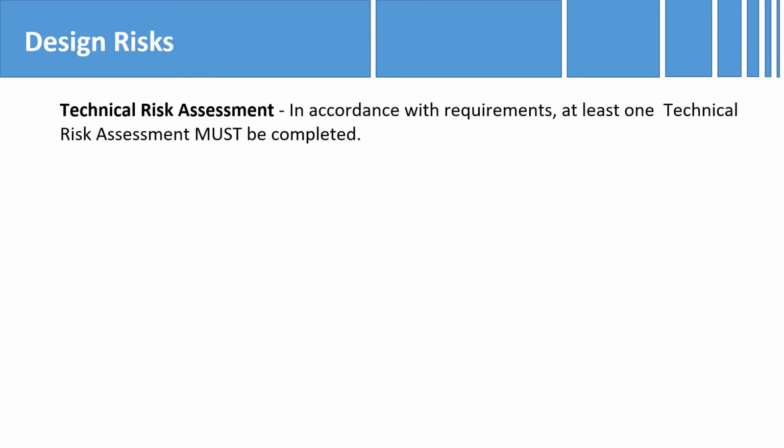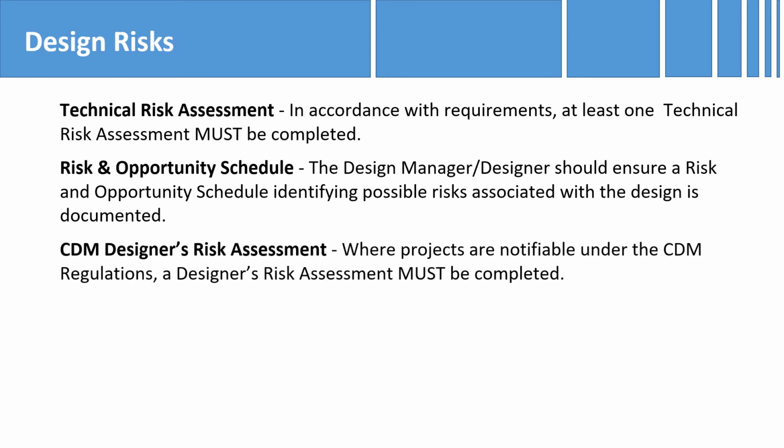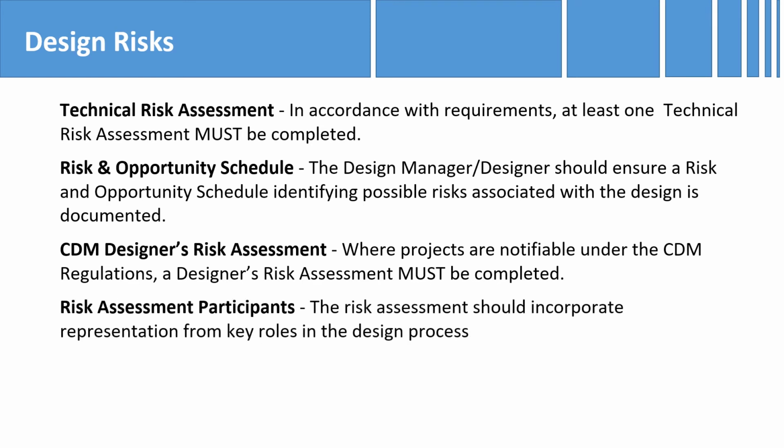Appropriate risk can fall under many disciplines and activities, of which the identification of technical risks is key to the safe delivery of the project. The design manager must ensure that all technical risks and opportunities are documented and considered in the applicable risk and opportunity register. If we are performing a designer role on a CDM applicable project, we must ensure that a designer's risk assessment is carried out. Risk assessment reviews can only be effectively achieved by having the right parties in attendance.